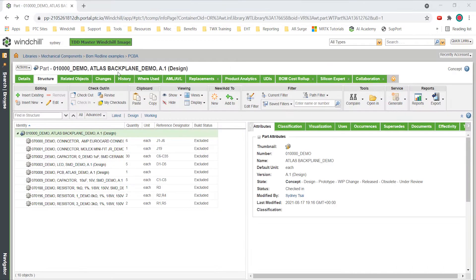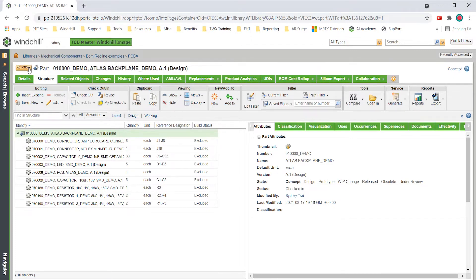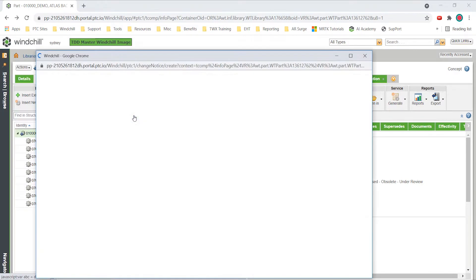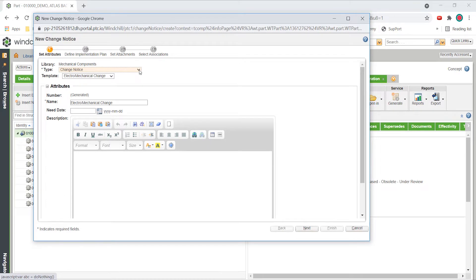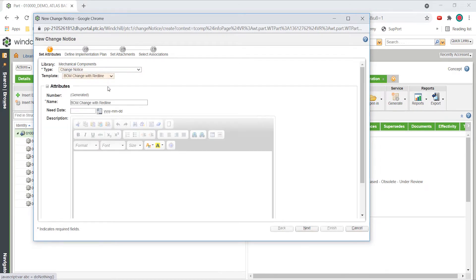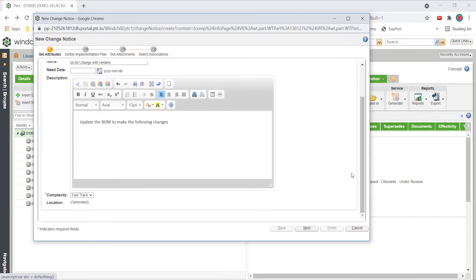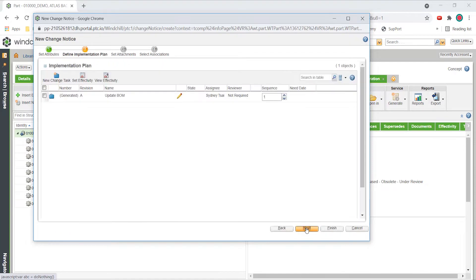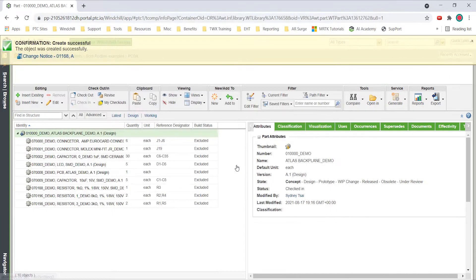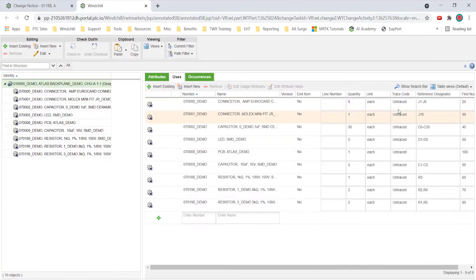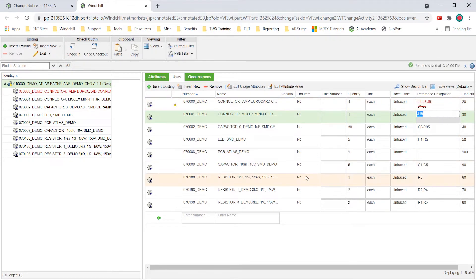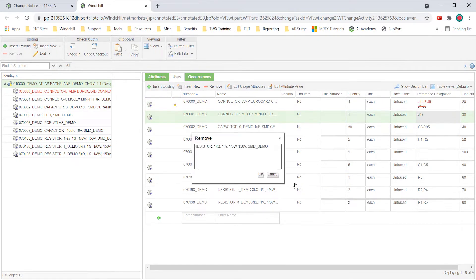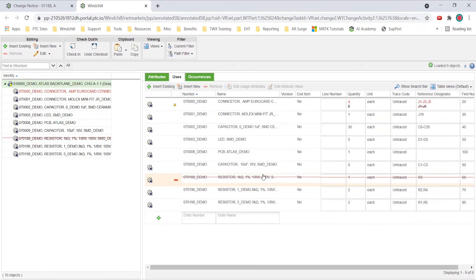With the new design and approved suppliers, one of Skyrider's configuration analysts sends out a change notice that includes all affected end items and plants. Without a well-prepared change request, Skyrider risks delays, additional costs, and uncertainty about what's being shipped to the field. Using redlining, change analysis, and BOM compare tools, the review team quickly analyzes the new and old designs.